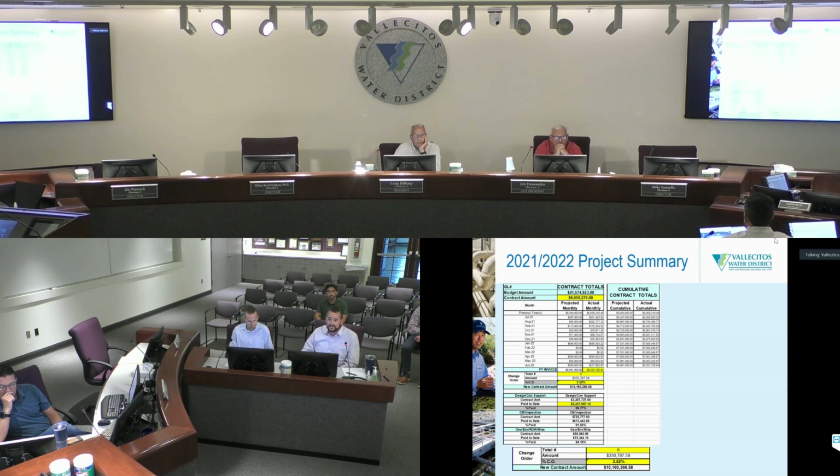Total on the year, we only had 6 change orders, which amounted to $350,787. The interceptor change order is in that, which is primarily why it's a little bit higher, but that's in total of 3.5% of the original contract work. So the new contract total just peaked over that $10 million threshold on the year.